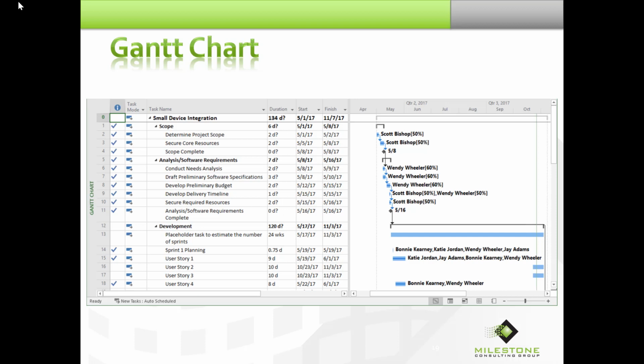And we have a bunch of activities that can't start until all of the development is finished. So in this case, we went ahead and linked the summary task. Now, some organizations just have a flat rule against linking summary tasks. That's fine. All you would have to do is link to the placeholder task, and you'll get the same effect.